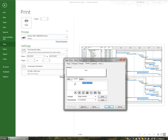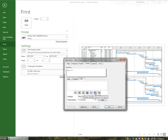In the footer I can see that page numbering automatically appears. I may decide to drag over that and delete it, then click in the left section, type the word 'page', press space, and click the button to insert the page number — that'll give page 1, page 2, page 3. Then press space, type 'of', press space, and click the button for the total number of pages. So for a large project it might say page 1 of 5, page 2 of 5, and so on. In the right section I might insert the file name — I'll click that option and it'll appear in the bottom right.